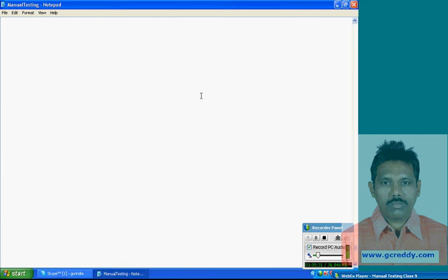Okay? Tell me, just once list out the entry criteria for test design and test execution, Rekha. Entry criteria for test design is responsibility allocation, roles, and schedule, requirements, test case template, etc. And optional are domain training, and if they are using automation tools, automation tools training.